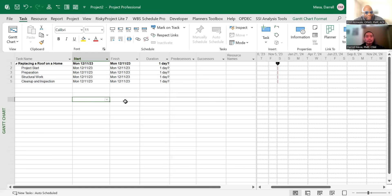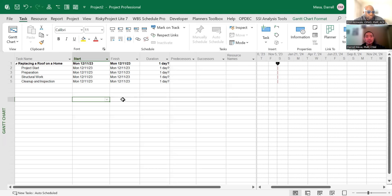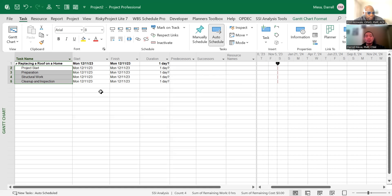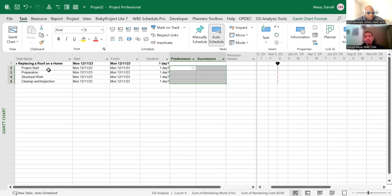Do I just decide at random or what is the best practice for getting durations in there? The best practice is to understand what exactly you're going to be doing from the start date to the finish date. A project is a temporary endeavor which includes all the activities within that project having a start and finish. With these tasks, subtasks I'm highlighting here from task IDs two through five, these are your tasks that you'll be doing to complete replacing a roof on your home. We have the option to either link them together, meaning task ID two needs to start and finish before task ID three needs to start.